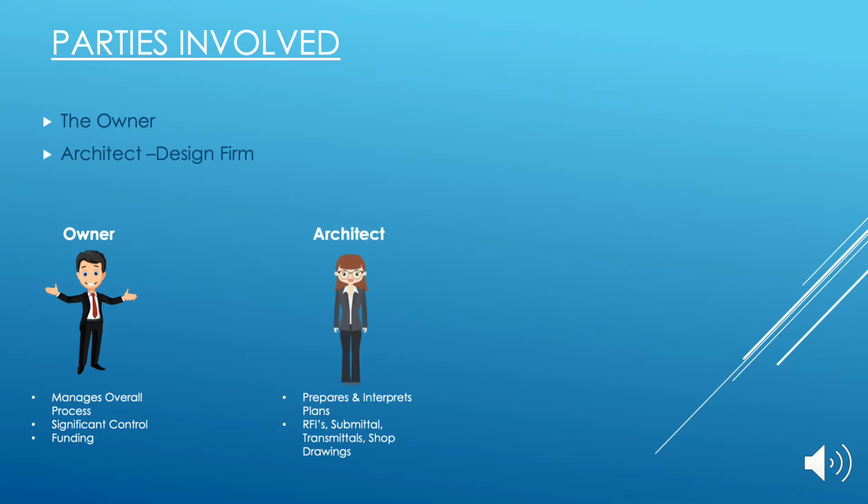Next, you'll have the architect or design firm, who prepares and interprets plans and specs. The architect will also be the person to assist the construction manager with any design concerns through RFIs, submittals, and transmittals. The architect will also be the one to approve shop drawings.